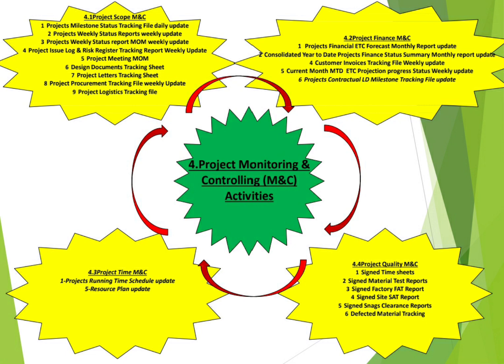Also, we have the project finance, 4.2, project finance monitoring and controlling. This is also very important, to have the project financials, estimate to complete, forecast, and a monthly report showing every project manager's forecast for his projects monthly wise.